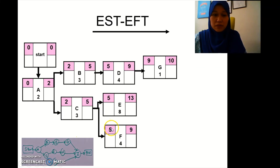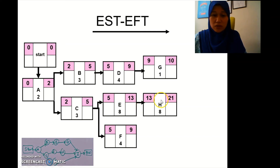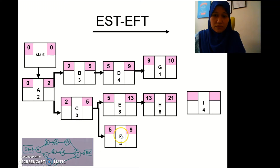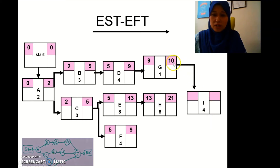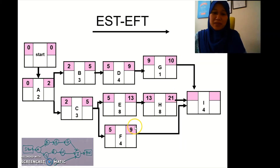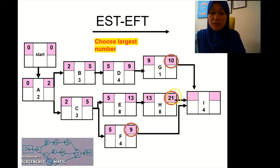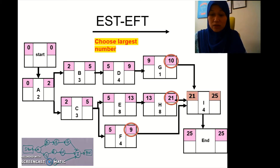Then we go to C. After C we have E and F. From E to H: we bring 13 here, and 13 plus 8 is 21. Then C to F: five plus four is nine. F, H, and G all go into I. We have three numbers — the rule says to choose the largest, which is 21. So 21 plus 4 is 25.